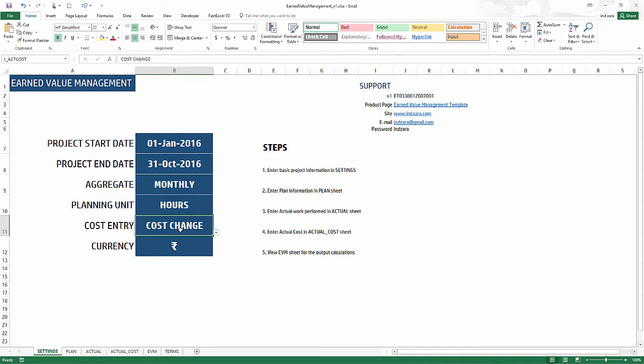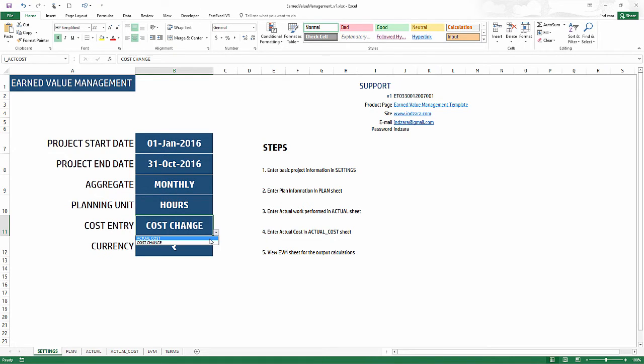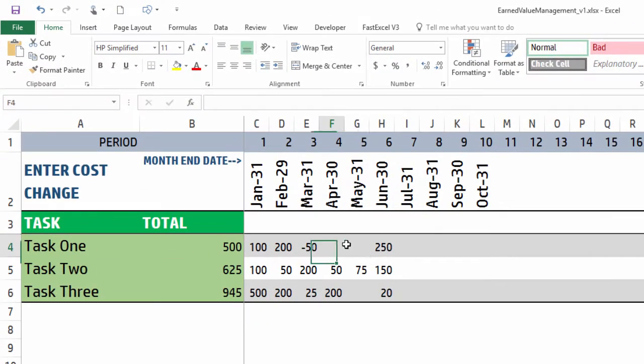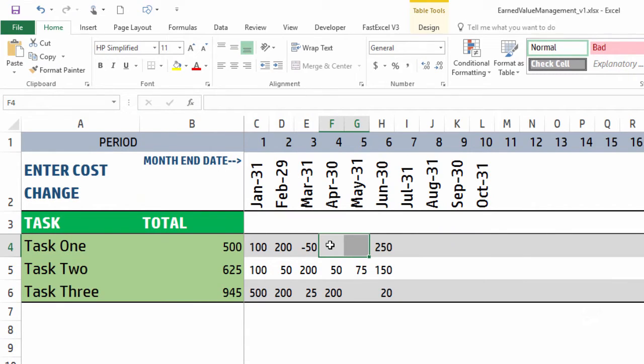If you don't want to do this, if you want to just type in the actual cost in whole, you will choose the actual cost option. I prefer the cost change option in scenarios where for most of the work you didn't actually spend anything extra or less - you spent as per plan. Then you don't have to type anything; you only have to type in wherever there is a change in the cost.